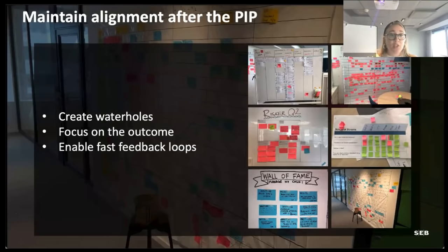That's the feature Kanban board, the program board, a visualization of the Scrum of Scrums questions, the risks, and I also recommend a wall of fame. So the items that are actually done are not moved to a done column. They're moved to the wall of fame, so we can celebrate some mini celebrations. Yeah, thumbs up on that one, good.